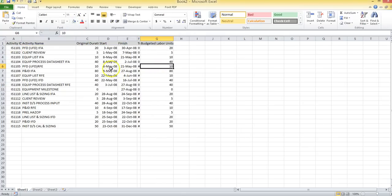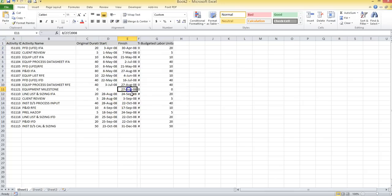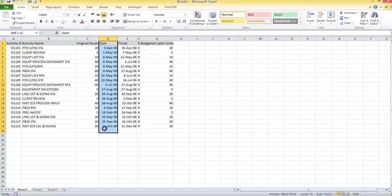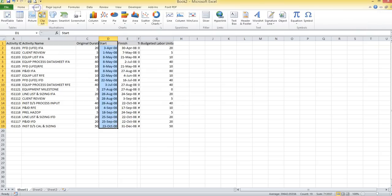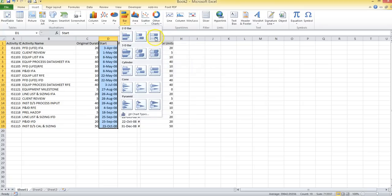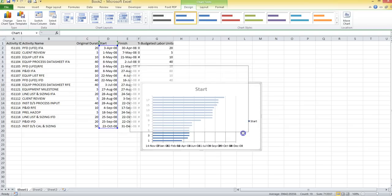Quick cleanup — I'm going to select the start date. Before I start, I want to show that this milestone has a finish milestone but I still want to represent it, and I'm only using the start date. So I'm going to copy the date over and put a five-day duration so that it shows up on the chart. You select start and go to Insert, horizontal bar, and be sure to pick the stacked bar — not the 100% stacked bar.